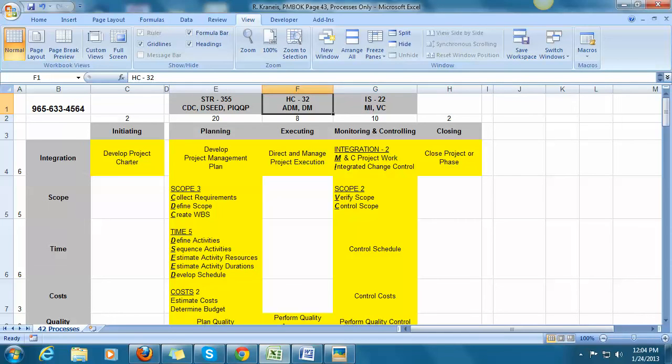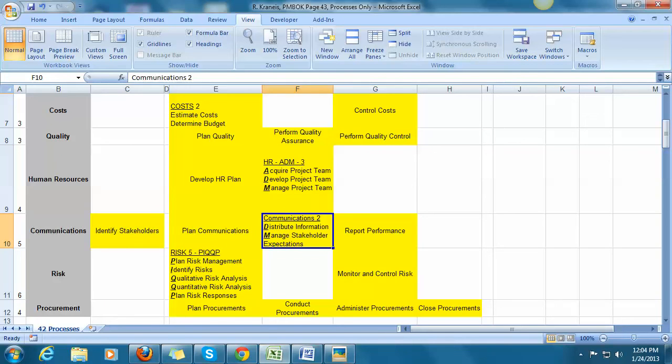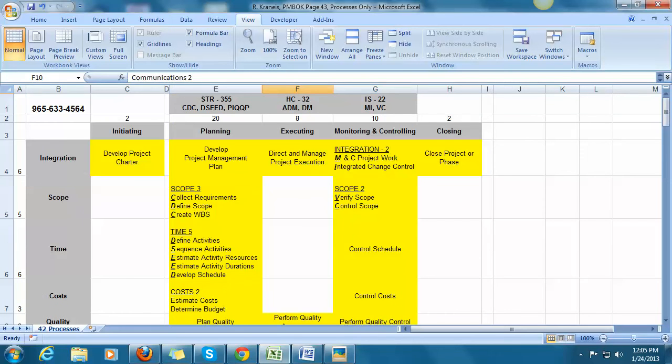And then for executing, I know that the main topics are ADM and DM, which means ADM is for Acquire, Develop, and Manage Project Teams. And Communications, it's Distribute and Manage. So you begin to learn these going across.